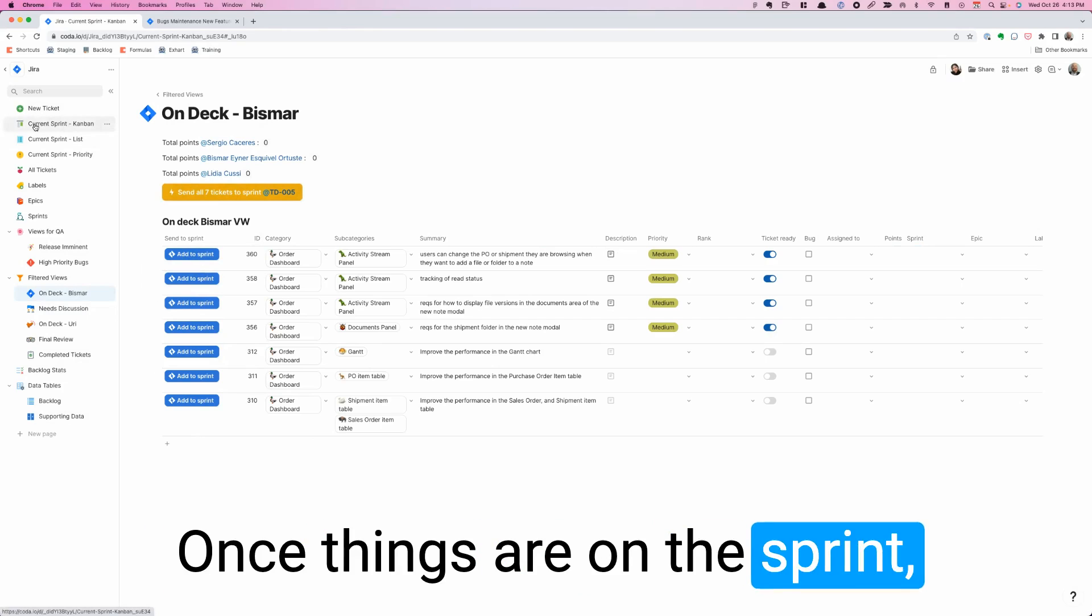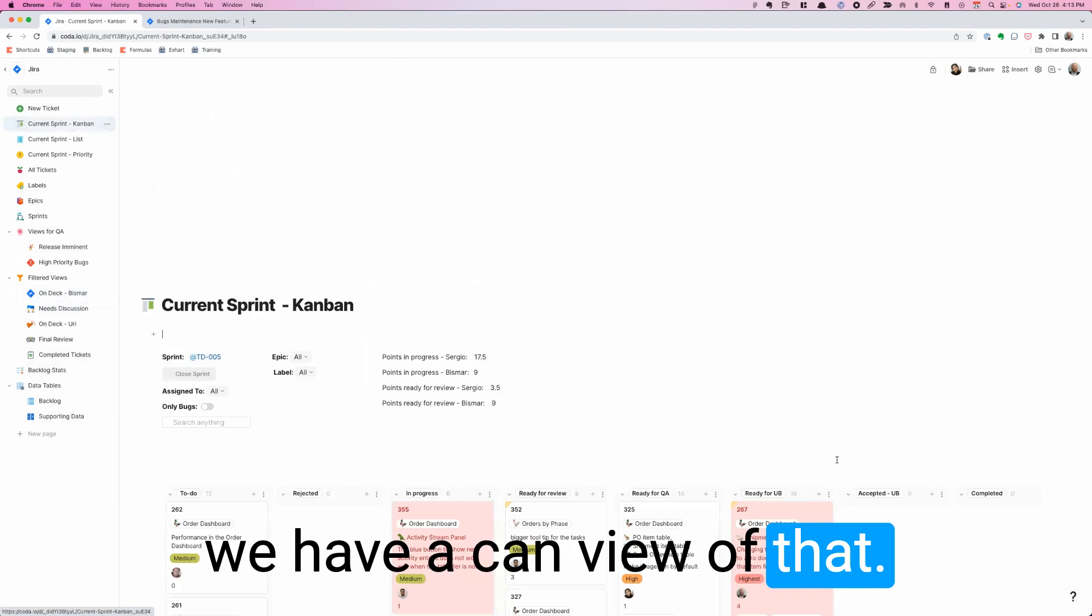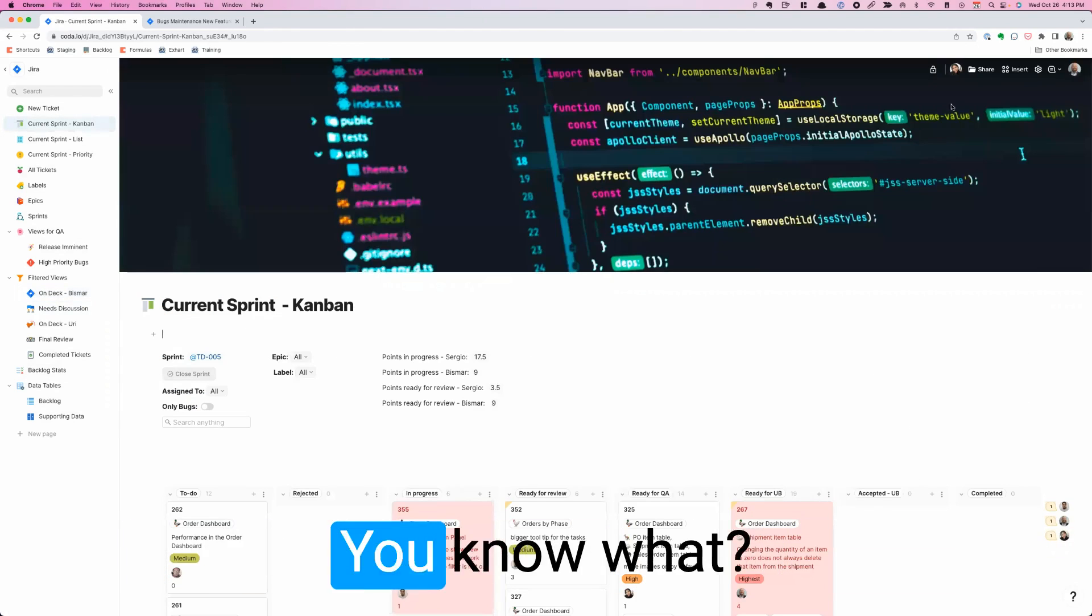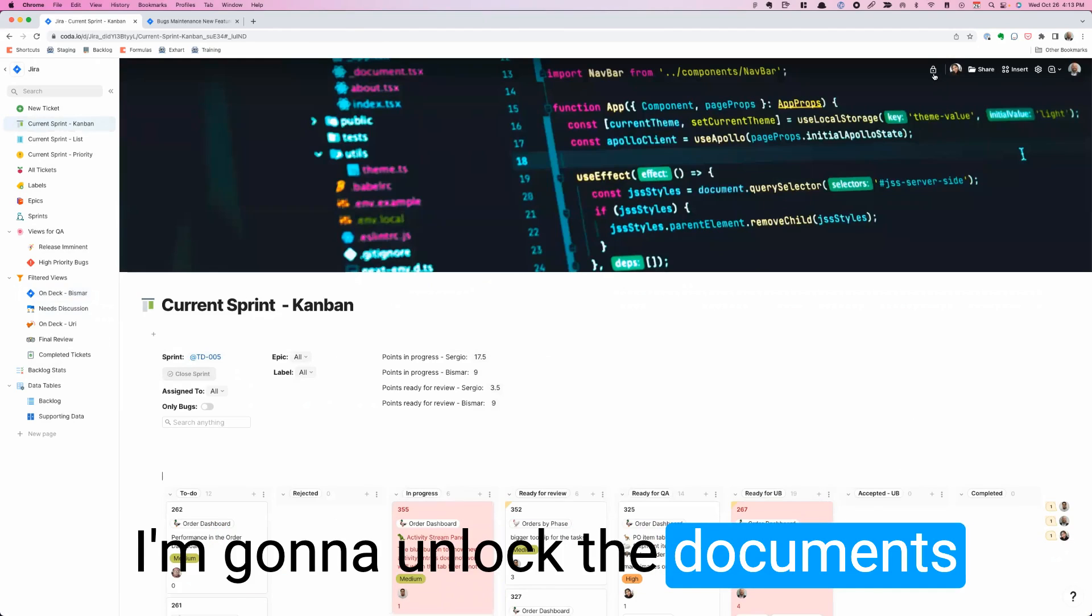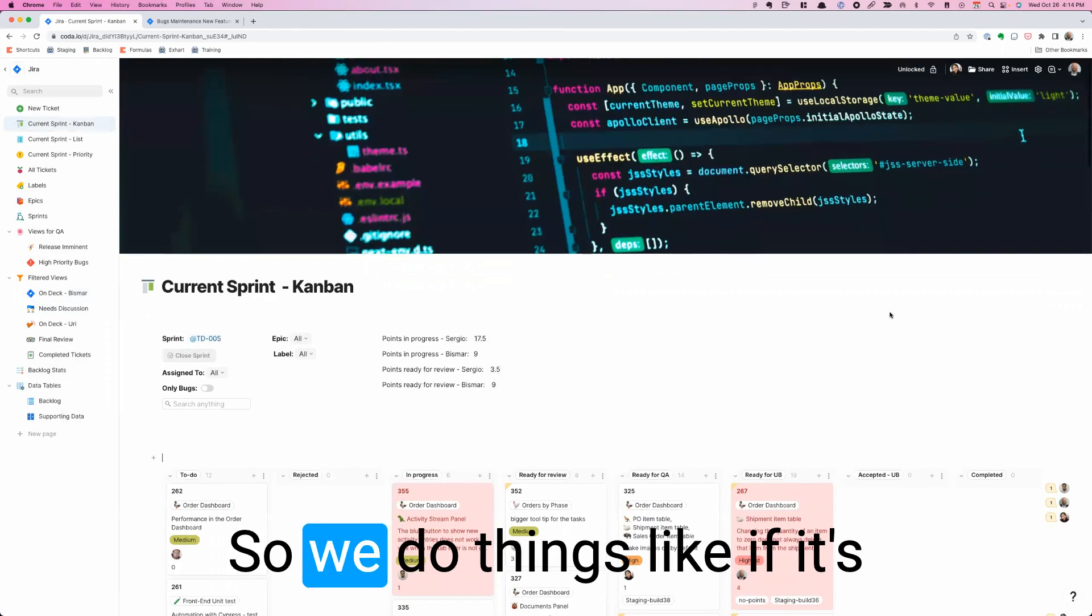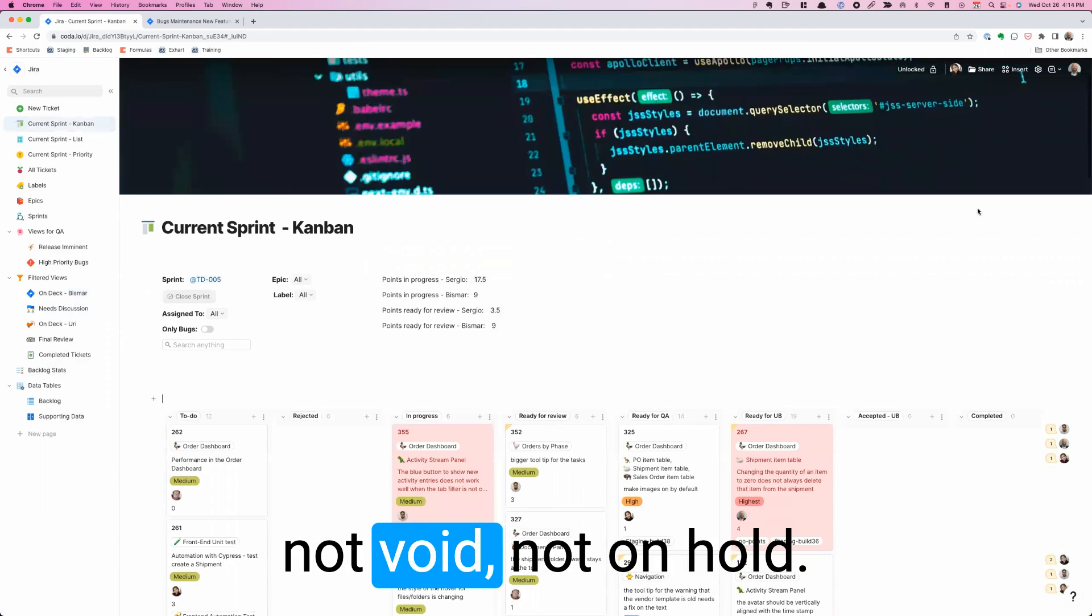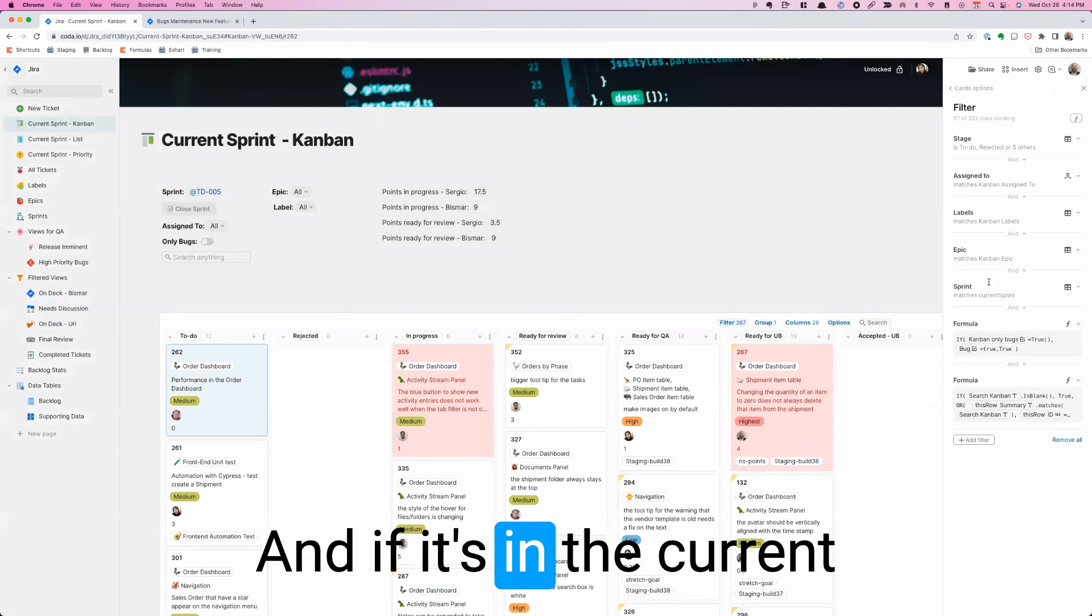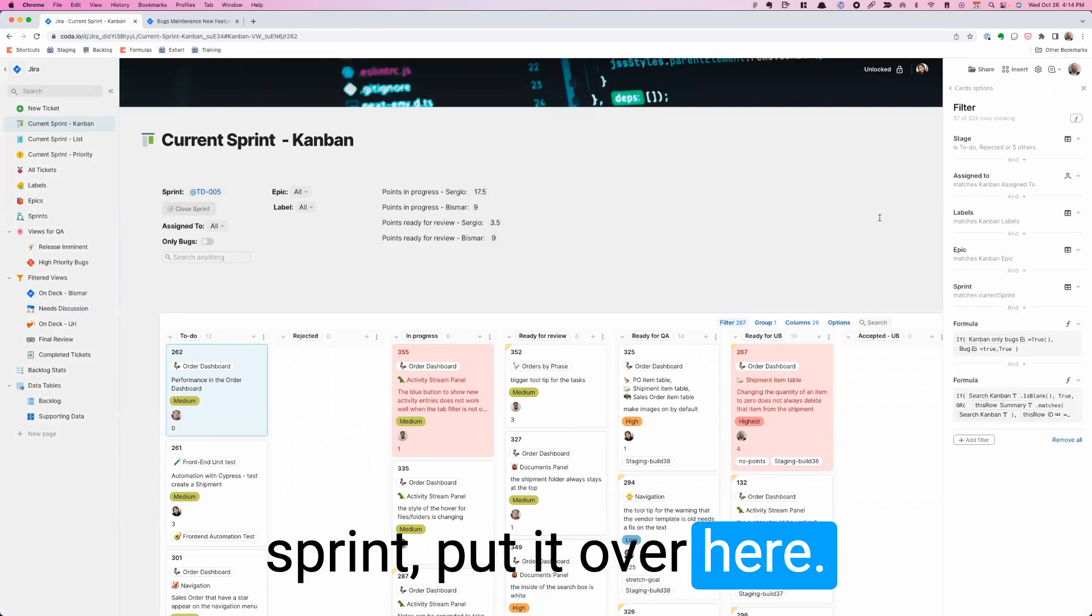Once things are on the sprint, we have a Kanban view of that. This has some built-in filters. We do things like if it's in the following stages, not void, not on hold, and if it's in the current sprint, put it over here.